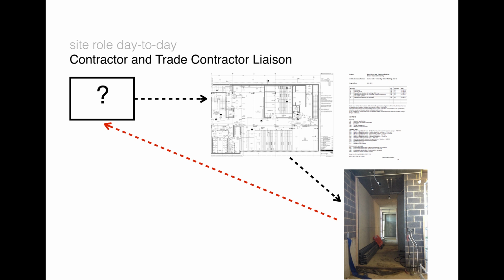The benefit of being on site is you can go out and have a look at what the query is directly and talk it through with the people who are trying to build it there and then. So you get a good grasp of the issue straight away. Whereas when you're in the office and you get an RFI, request for information, come through, which is just written down, it can sometimes take you quite a long time to work out exactly what the question is, what's going on, and why they're raising it. And then normally that feeds back into a pretty quick response, which means that you've shortcutted all of that paperwork, all of that time in the office, by being on site and getting straight to the heart of the problem.